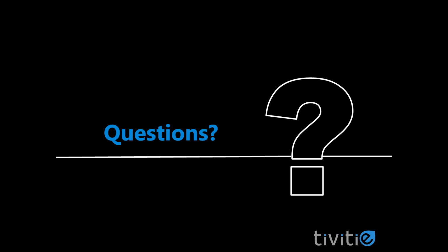So what I like to do is I tend to just ignore those in my leveling. So I would do a leveling selection, and not include my level of effort. What that will do, though, is it will still most likely give me an overallocation because I haven't included the level of effort. So I can either manually work through that, or I can go in and change my max units to exclude the level of effort work and then do my leveling from there.